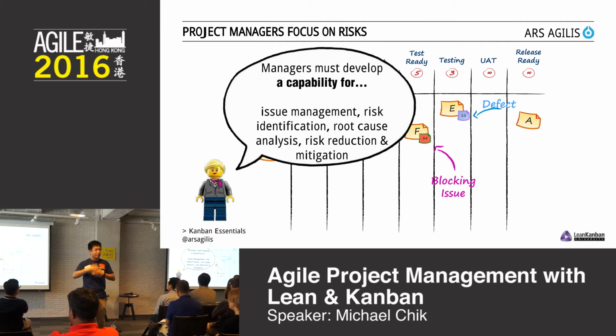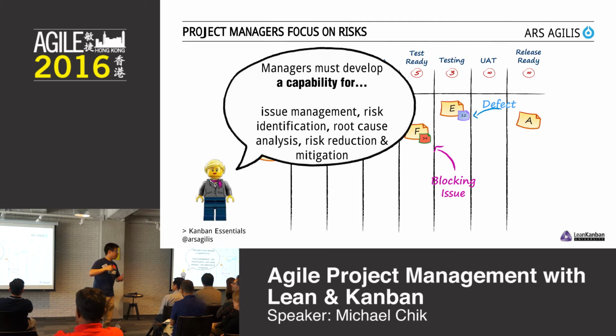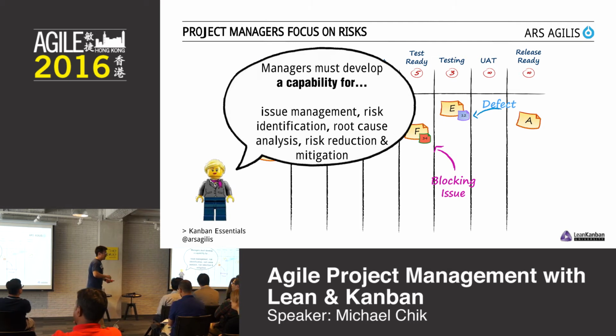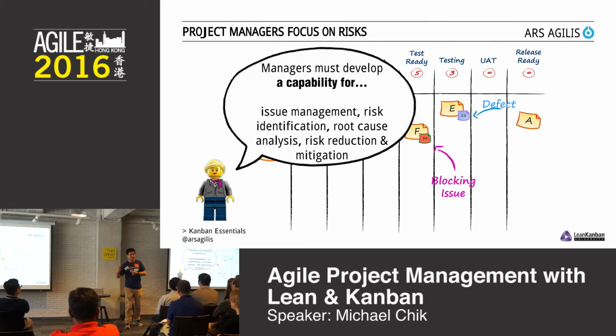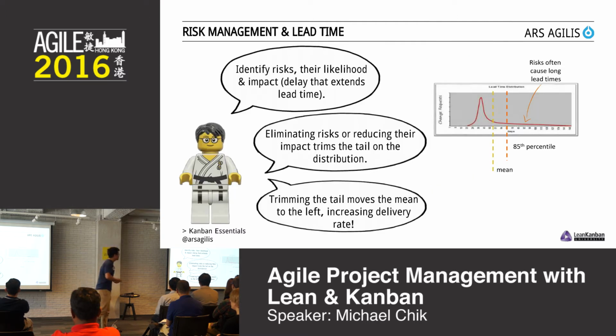When we follow this, and you're a project manager or you work a lot with projects, it changes the discussion to how can we prevent long-living tickets, because they are the ones that skew my projects drastically. And it goes into a discussion of risk management, because all of those are risks. For example, having some huge tickets that are really vague that no one knows about, that's a risk. So maybe the reaction could be, let's split it down. Maybe. To identify risks, the likelihood to impact, the likelihood to create a delay. I'm running out of time.